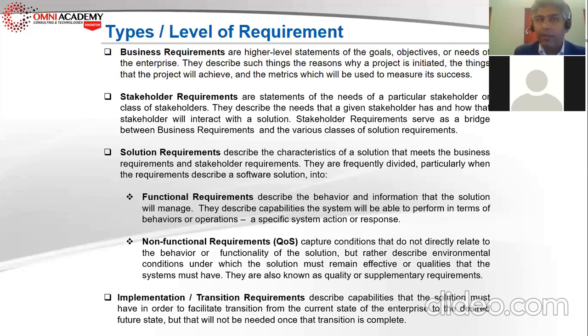And whenever you are implementing a project, whenever you get the requirements, understand the transition requirements. Ask them how much data they have, how it will be transmitted, how this solution will be implemented, whether the people have the right knowledge to operate the system, and whether they have the right software and hardware to use it. So this is very important. Otherwise you waste a lot of time, and it even leads to project failure, because the people will not accept the project if there is no right infrastructure available.